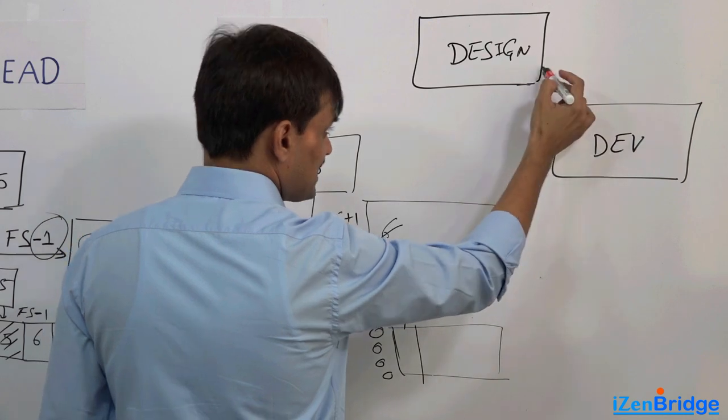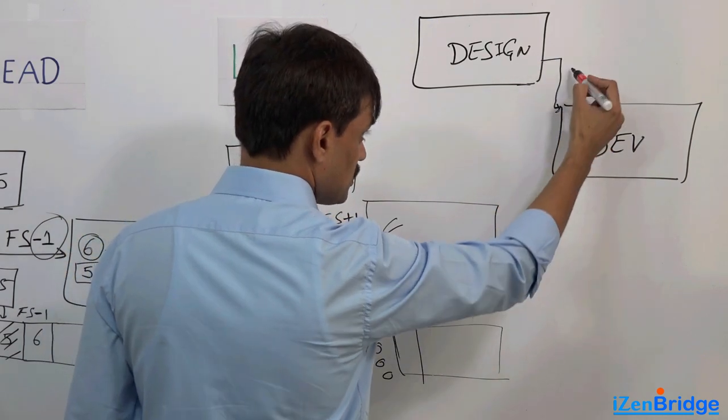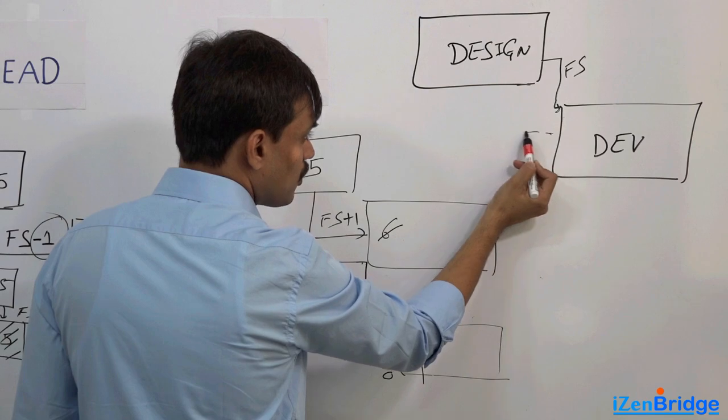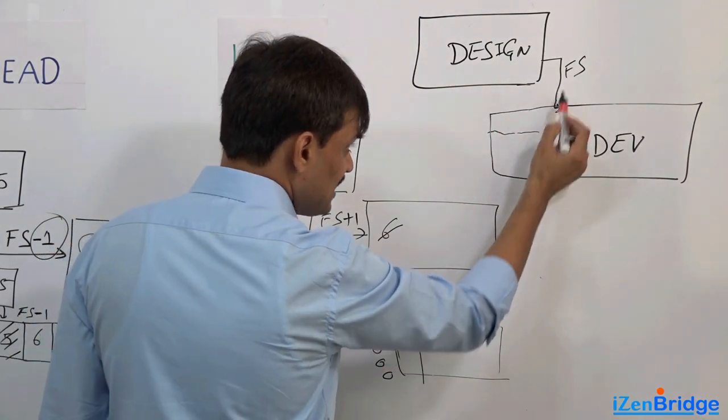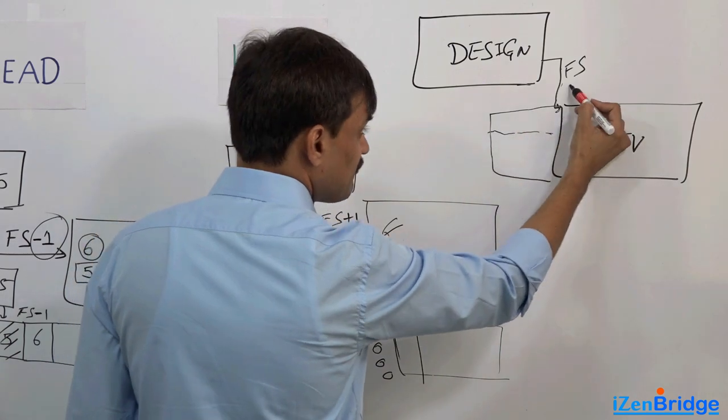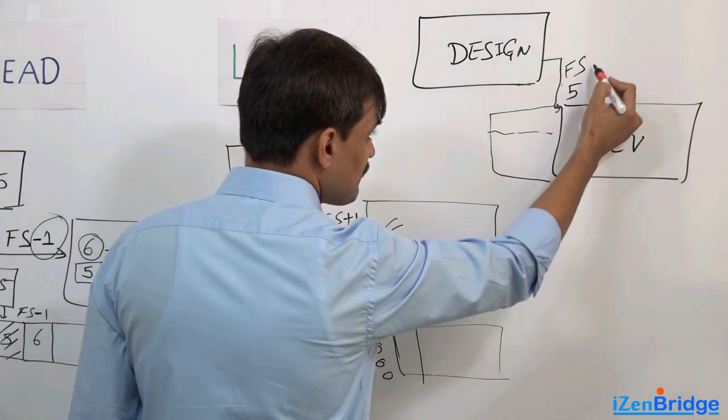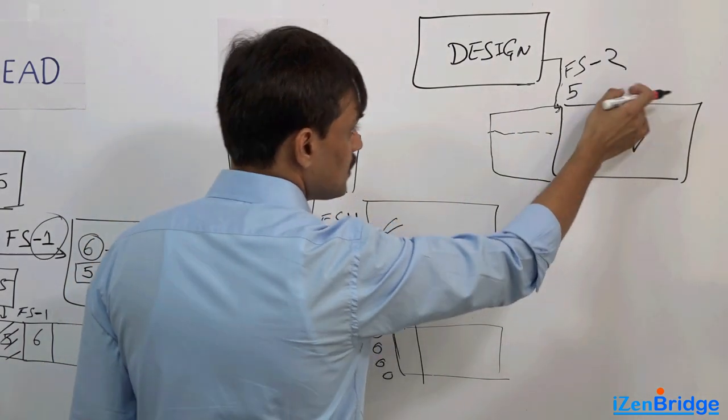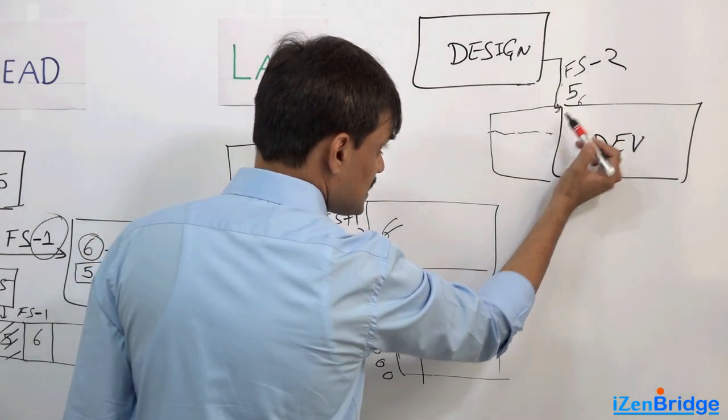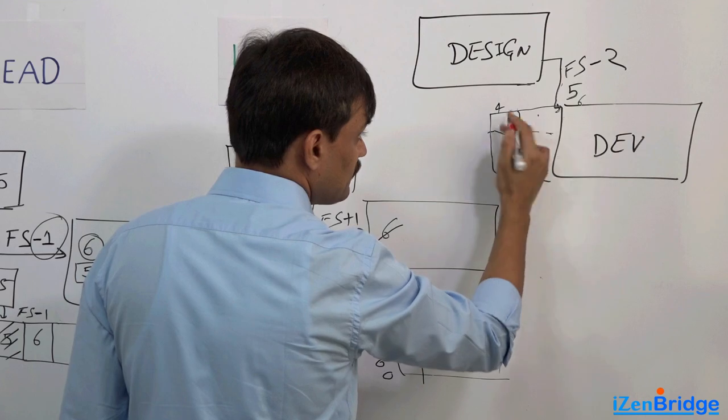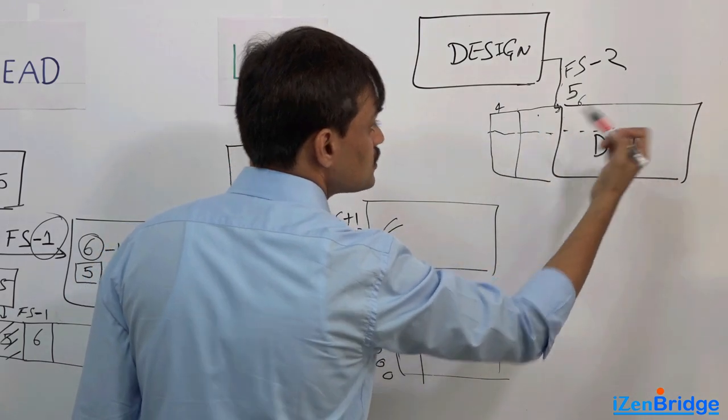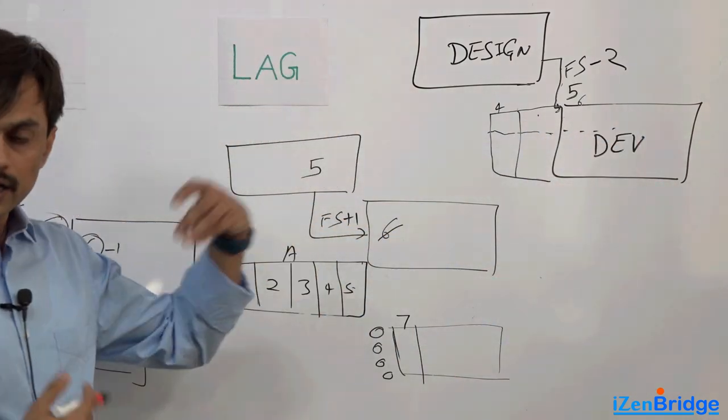Now it has a finish to start relationship. But sometimes you think okay, some little bit of parallel can happen. So when it is expected to finish on day five, if I say FS minus two, it means rather than starting on day six, I can start on day four. So there will be day four and five it will run in parallel, and day six onwards it will be a normal thing.